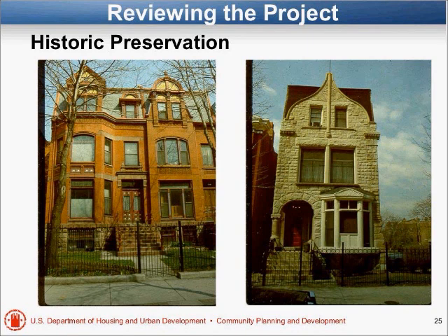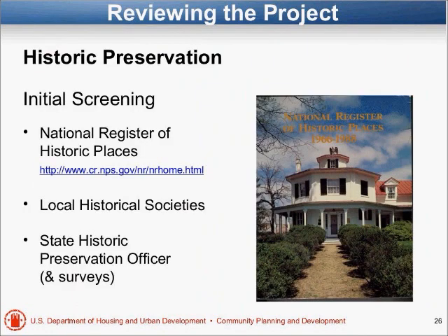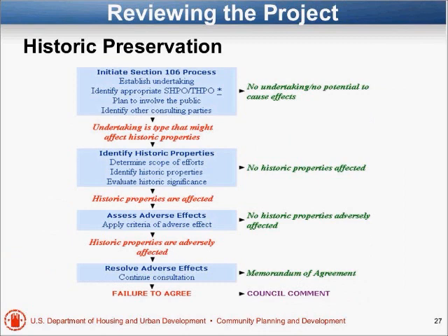Historic preservation is another item that's expected to be on every environmental review. At the very least, we want a sign-off letter from the State Historic Preservation Officer, at least saying that there are no historic properties affected, but maybe it's more complicated than that. Some of our best projects affect historic properties and have an adaptive reuse that'll put new life into old buildings. If you're dealing with a private developer, there are significant benefits to rehabbing old buildings.